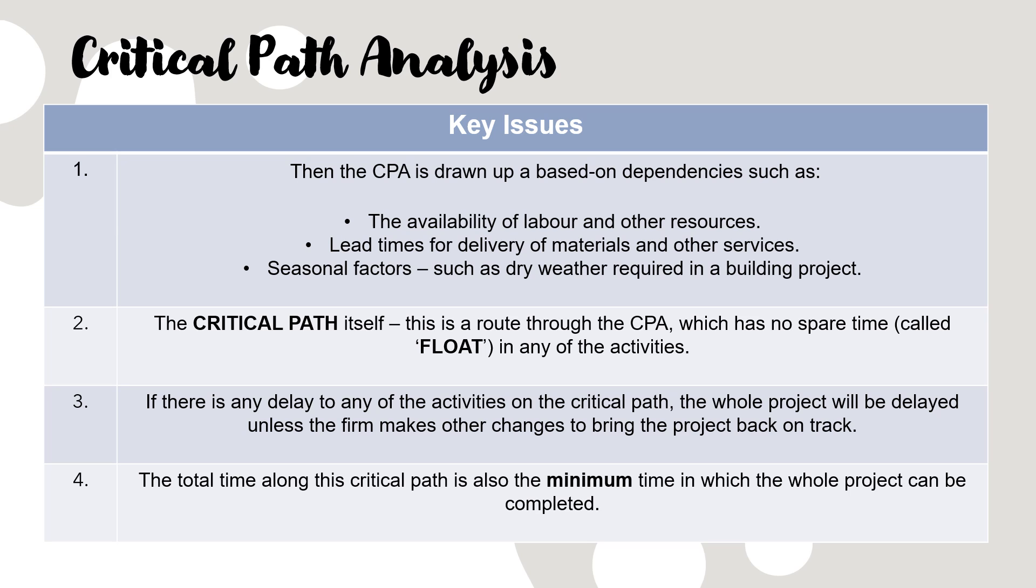Where this becomes an issue for businesses - if you win the contract to construct something, be it 200 houses or be it a stadium. Wembley Stadium in the UK - an Australian firm won the contract some years ago. Unless you are functionally stupid, the people awarding the contract will agree a completion date for the project, and if that completion date is not achieved, there'll be financial penalties for every day, every week over and above the agreed date. That happened with Wembley Stadium, and it got to the stage where the FA, Football Association in the UK, had to waive some of the penalties - they were becoming so large. It was so far over the projected time to complete.